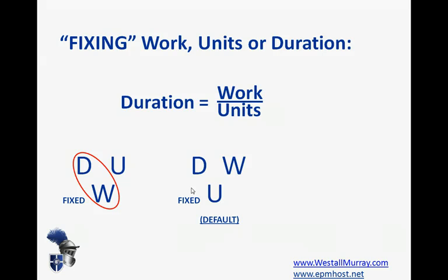Let's look at the default situation where tasks are fixed units. Again, because this is anchored here, the units, then what's left to vary are these two. So if we increase work, duration changes. Increase duration, work changes. If we change units, then it's duration that changes again. The project changes for us.